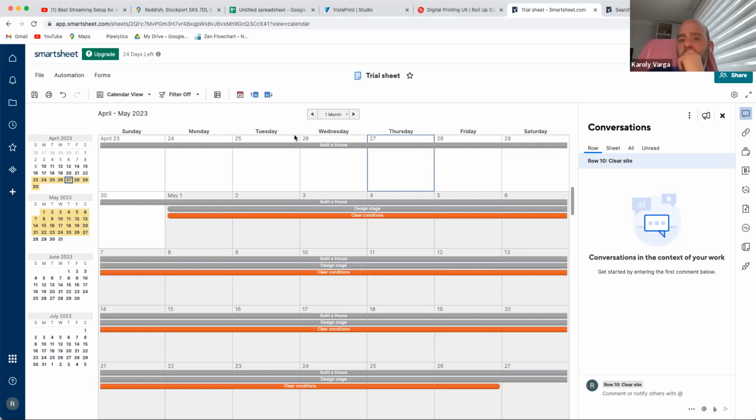And as I said, if you're doing loads of extensions, or you're doing loads of new builds, once you do the master program for one, with all the calling times and stuff like that, all we have to do is run through and adjust it for the actual project rather than actually rebuild it straight away. So it's a quick system to use.